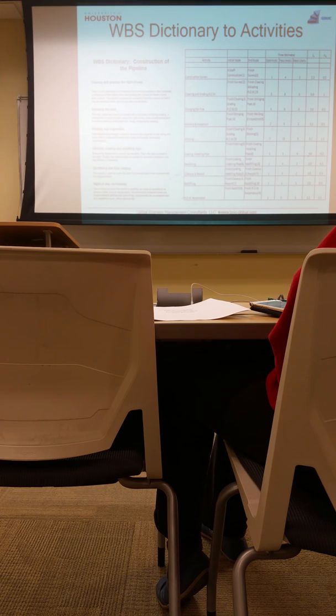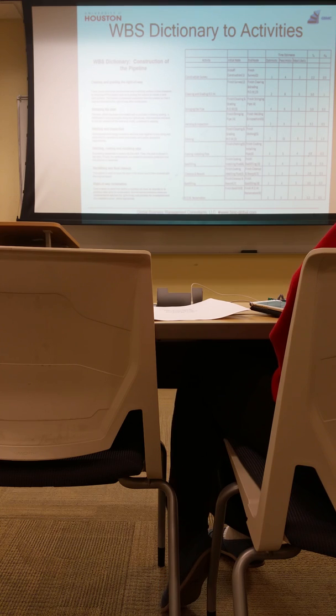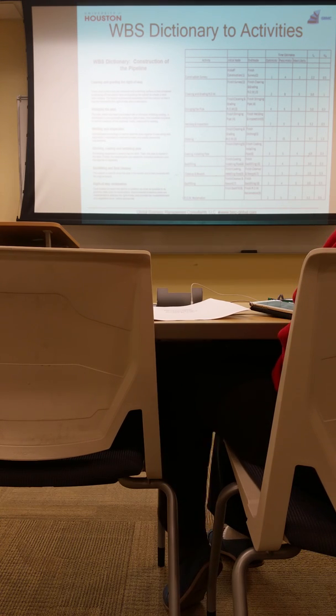In fact, for the estimate that we're going to look at that I did, or that I'm doing for this project that I'm working on Thursday, I gave him a range. I wouldn't give him a number. Okay, you ask, well, what number to give him? I didn't give him a number. I said about this much in terms of schedule, and I said between this and this in terms of cost. So it's important for you not to lock yourself into these things right away, when you're doing the estimate. You want to refine the estimate as you get more information.